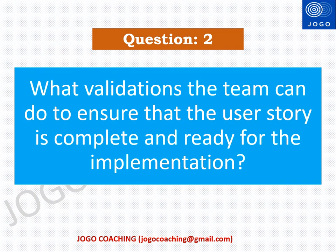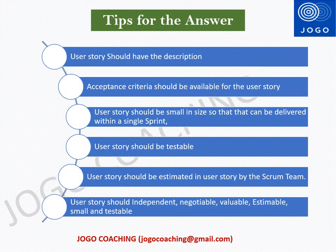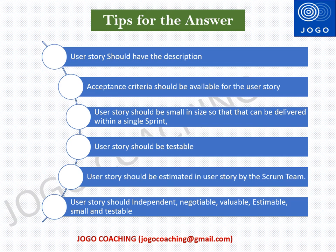Let me give a few tips to answer the second question: what validations can the team do to ensure that the user story is complete and ready for implementation? A user story can be considered complete and ready for implementation if it meets a few conditions: it should have a description, acceptance criteria should be available, it should be small enough to be delivered within a single sprint, it should be independent, testable, and estimated in story points by the team. In short, a user story should be independent, negotiable, valuable, small, and testable — these are the minimum expectations to qualify a user story as ready for planning and implementation.